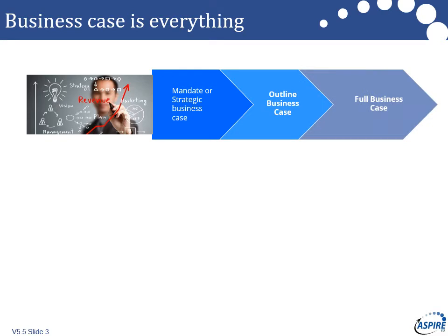Those three stages are there to help decision making, and they are there to stop a big program and project running out of control and picking up too much momentum. So the idea is that from a governance perspective, we can actually stop this thing. Now, the truth of the matter is, if you look at why big programs go wrong, many of them were starting to go wrong very early, but nobody seemed to have the authority to challenge why it was still continuing, particularly if it had some political connotations to it. And so when we're looking at it from a business case point of view, governance, it's all about those three stages, making sure that we're committing and the right people are involved.